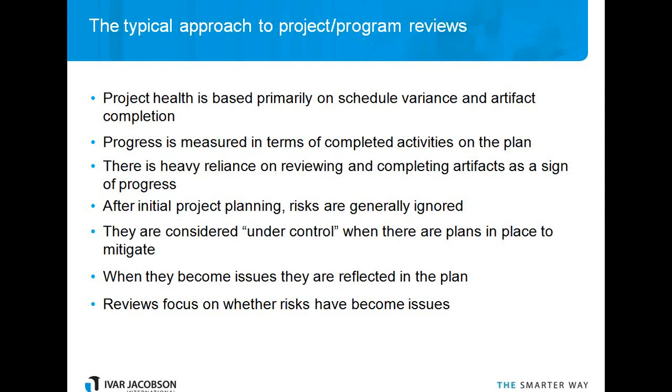So it's typical at the beginning of a project to identify risks, but in most cases the risks are not all of the risks to the project, but often just the things that are related to whether the schedule is valid. So there's risks in there that there might not be enough resources, or some project team that you need to coordinate with might not deliver something on time.